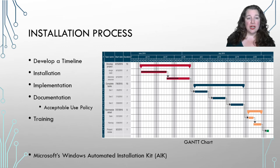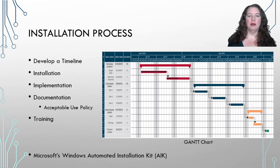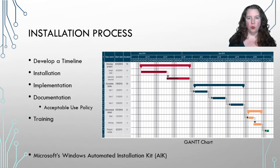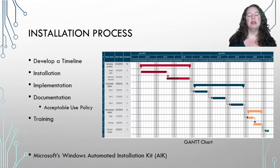When you develop your timeline, get together a team — sometimes you can do it all yourself depending on how big the network is. Think about how you're going to do the installation and how long it will take. Do you need to order parts or do you already have them? Once you have the parts, implement any software changes needed. Installation means putting the hardware in place; implementation means making sure all the software is in place as well.